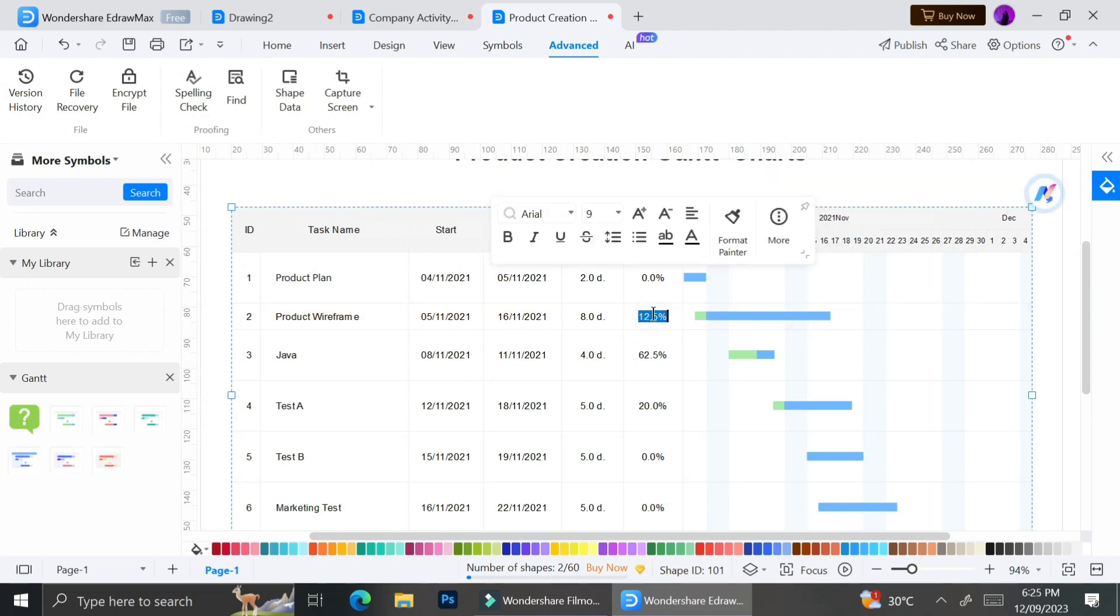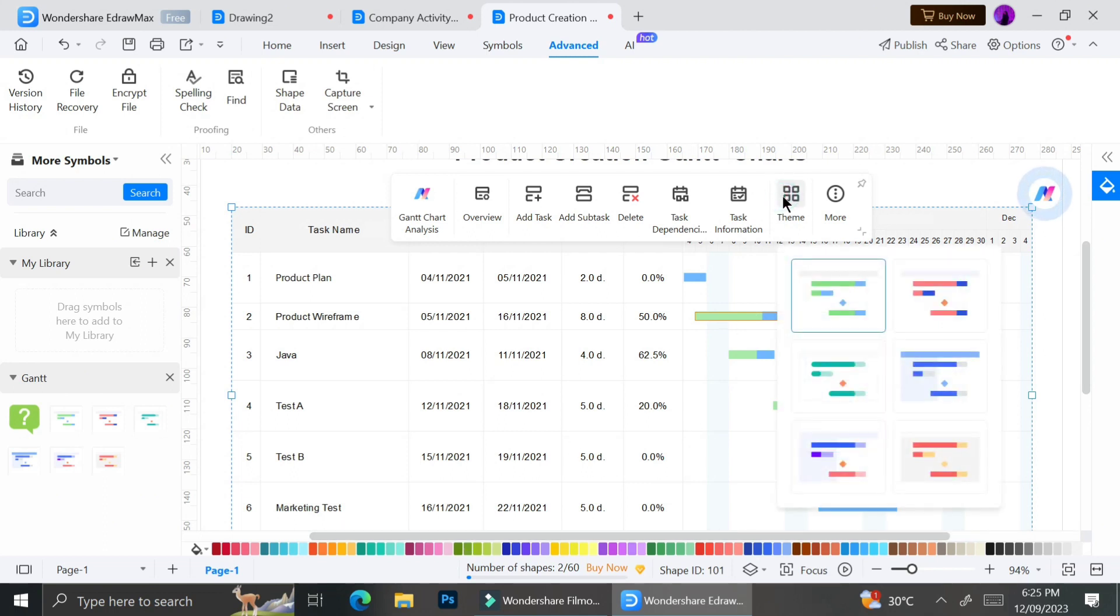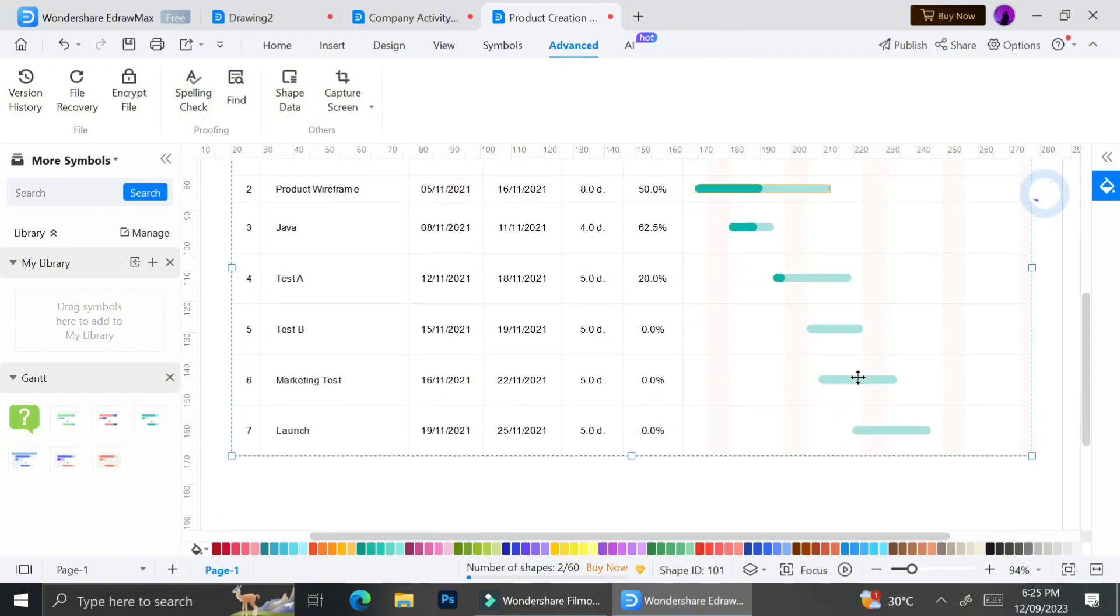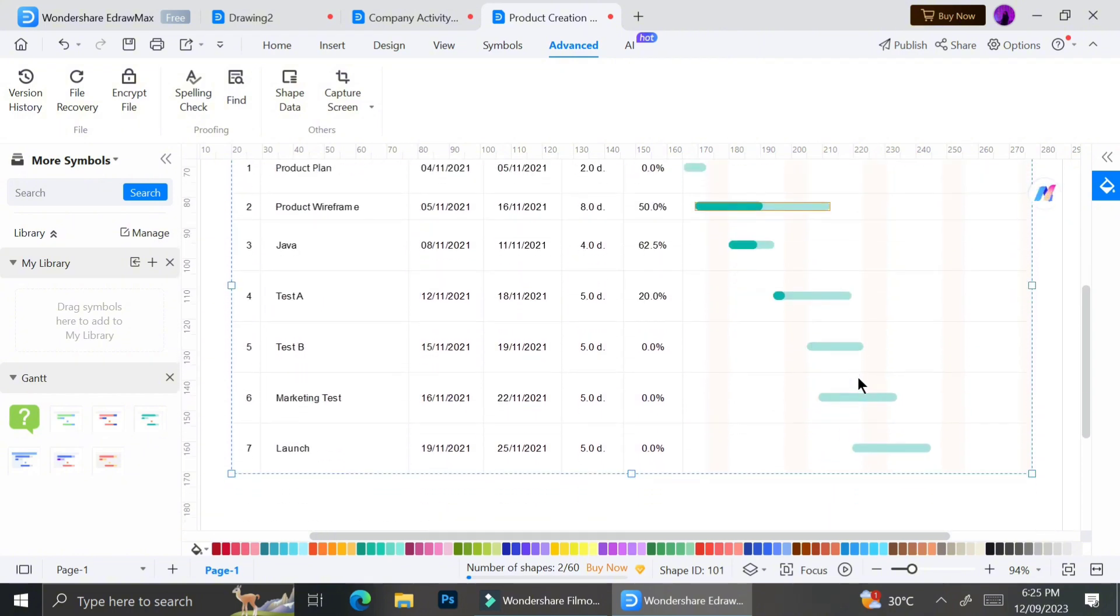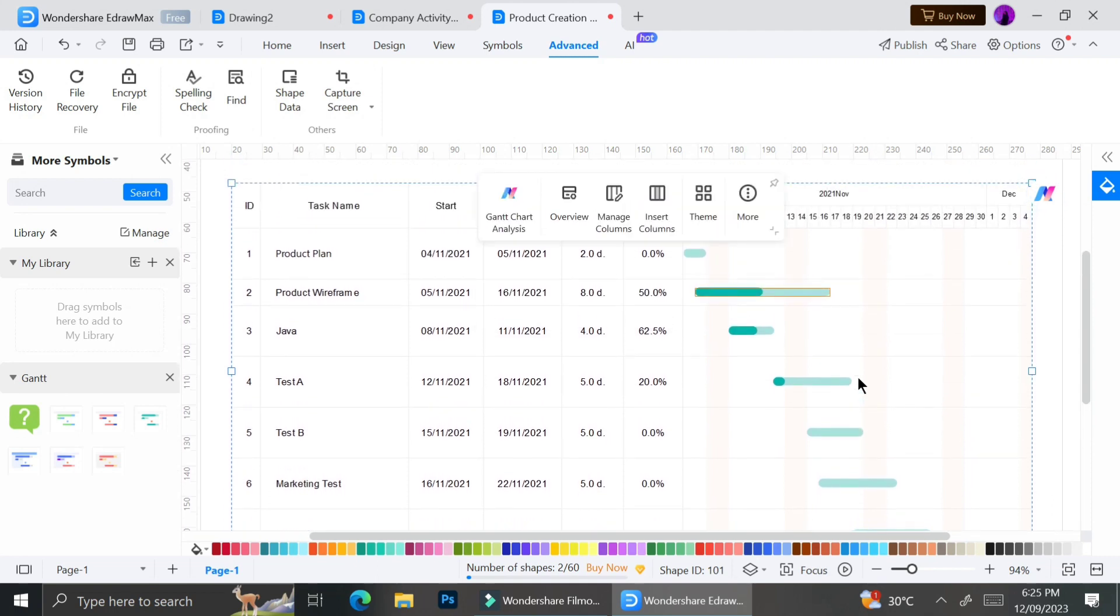Look at how the progression bar gets longer. That's what will happen if you change the duration of a task. Now let's see if we change the percentage of how much the task is done. Also notice that the different colors of the progression bar represent different things. The blue represents the days it took to make that task, while the green represents the amount of work that I've already done for that task. As you can see, the green color also changed according to the percentage we input into the chart.